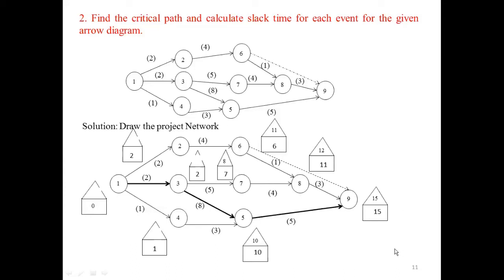Similarly, for other nodes, that is for node 3, you have 8 minus 5, we will get 3. But if we consider from node 5, 10 minus 8 will get 2. That is, the minimum is 2, and hence here you write 2. In simple terms, in the backward pass, you have to enter the values in the triangle. That is, a minimum value you have to enter.